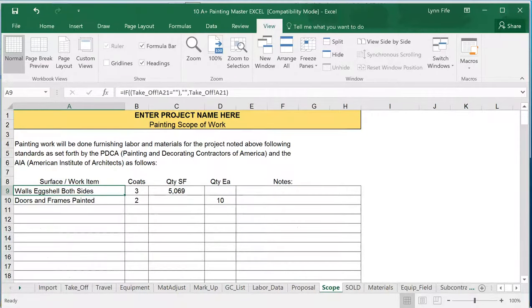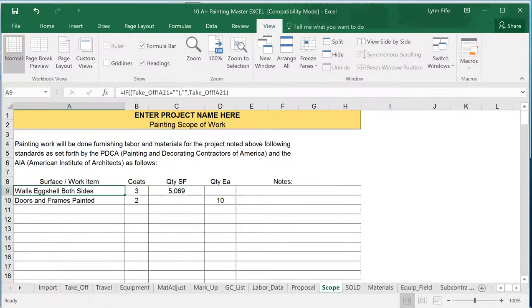A simple scope of work, identifying the line items, how many coats, how many square feet that you can give to your painters in the field, or your field foreman to give them a brief description of here's what this job is all about.